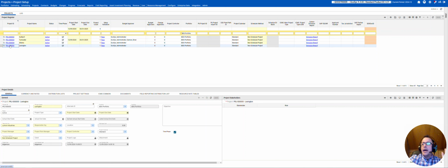There were a set of screen layouts that have the root cost object parameter, but it was set to same where it needed to be set to cross.